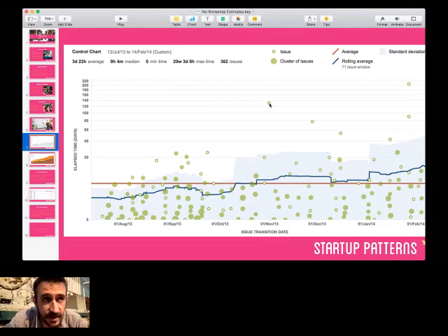I took this chart off the internet, but I've seen examples like this. Maybe that was stuck waiting for something from marketing, or we needed to get approval from legal. It doesn't matter. But the point is, the actual work time to build that feature may not have had anything to do with the actual time it takes to get it out the door and deploy it to a customer. So this is why it's absolutely critical not just to understand the building time, what you can do as a team when you're actually coding, but to think about the overall development process as a system and realize that there are these big contributors as well, right?